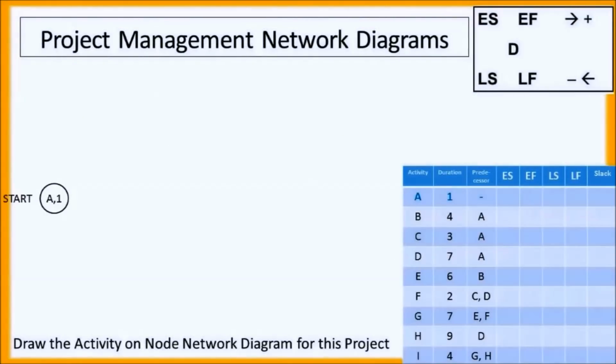Okay, let's get started. The project needs to get started at some point. The only tasks that can be completed at the beginning of a project are ones that don't have any predecessors, which means these are tasks that you don't have to complete anything prior to completing. So they can be done first. In the chart of tasks on the lower right, for all of these problems, you will just look for all of the activities that have no predecessors. In this case, we only have one, and it is activity A.